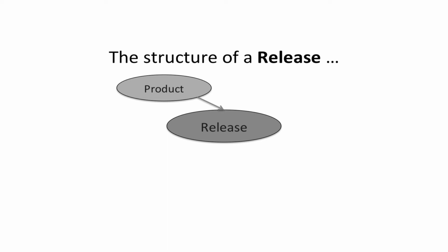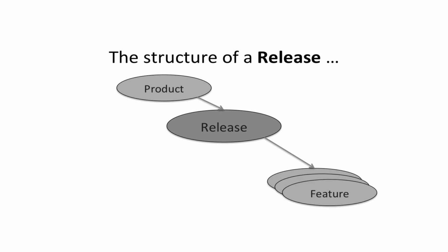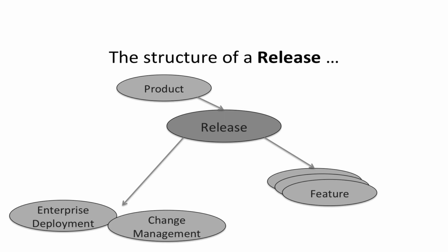You may have a project that has multiple releases because they need to coordinate the update of several information technology products or services. But a release is made up of one or more features. And again, a feature is a business definition that comes out of the service design package. As that release is crafted, it's been worked on, and it needs to go through the deployment process, it's going to relate to either enterprise deployment or change management.